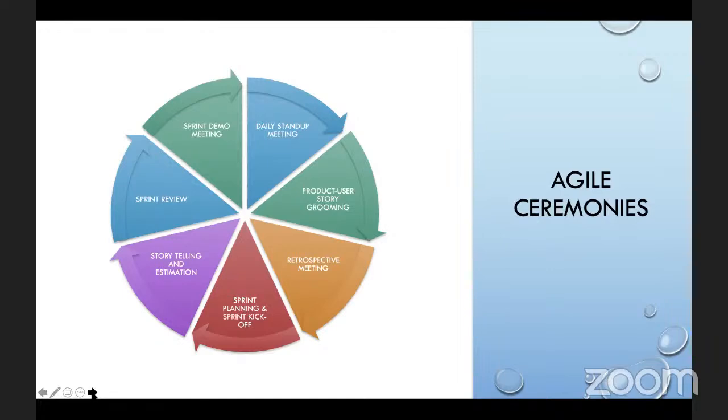And then what do we do? We look back at what we have done for the past 2 weeks. And then we talk about ways that we can become better as a team, ways that we can improve. Usually there are 3 core pillars that teams look at when we are having retro meetings, right? Number 1, what can we stop? There are certain things that we are doing that do not help us, right? There are things that people are practicing as part of the team that we think are not helpful, not beneficial. So number 1, what do we need to stop doing as a team?